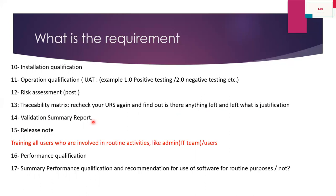After the traceability matrix, prepare the Validation Summary Report. This report covers everything from the beginning of the change control up to the final release note. Auditors specifically ask about the Validation Summary Report because they want to see your entire approach in a single document — so this is a very important document. Then provide training to all users involved in routine activity, such as the admin team and user team. Finally, perform Performance Qualification in your production environment, which gives a summary recommendation on whether the software is ready for routine use.